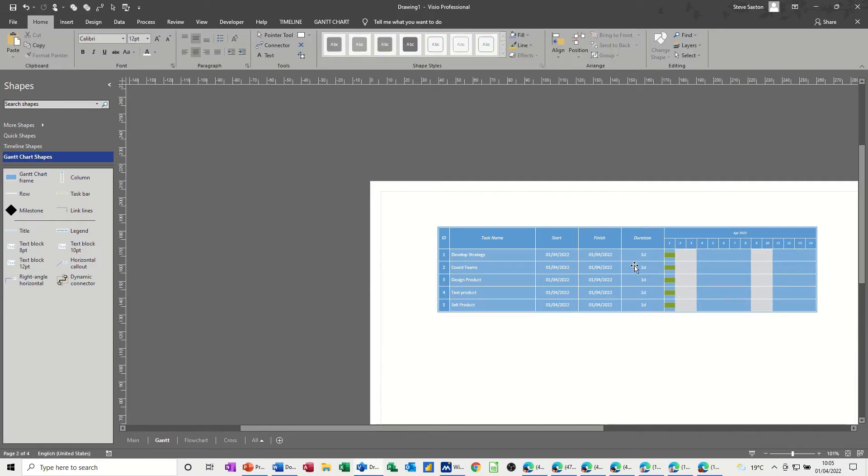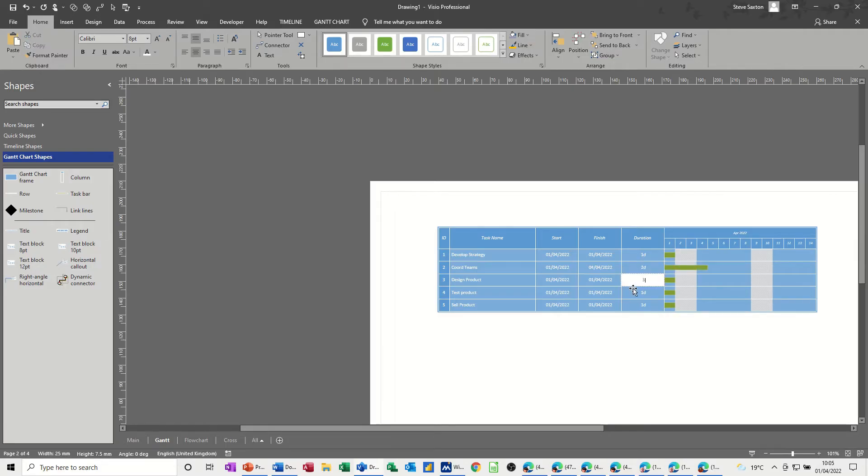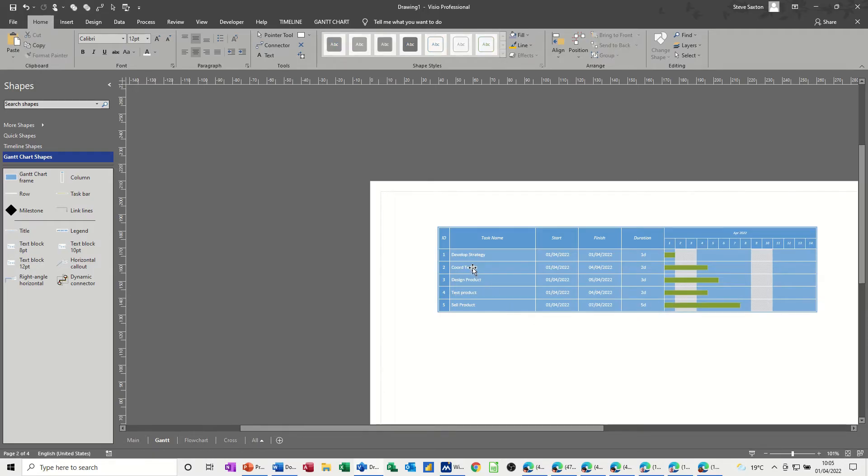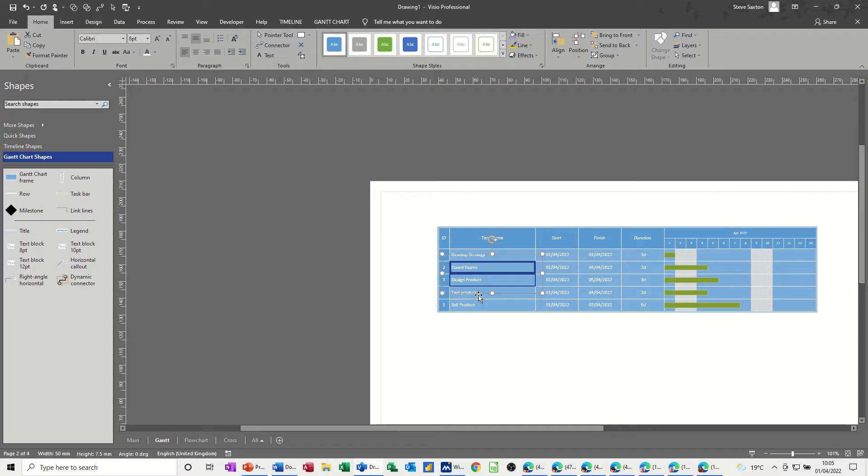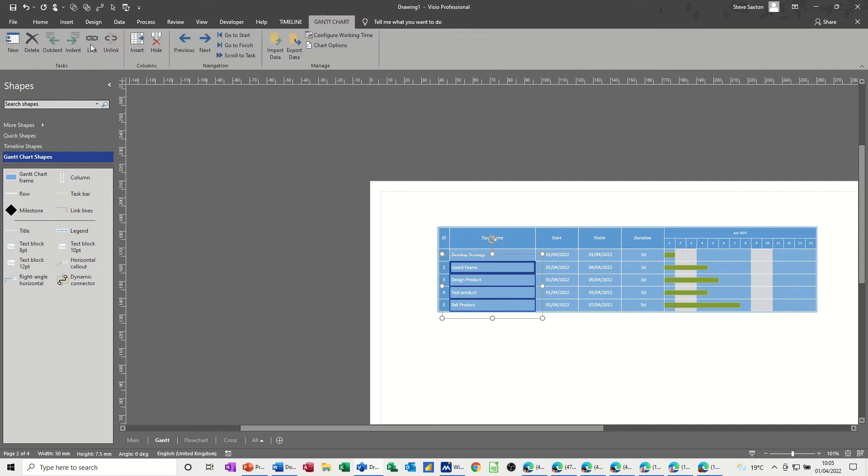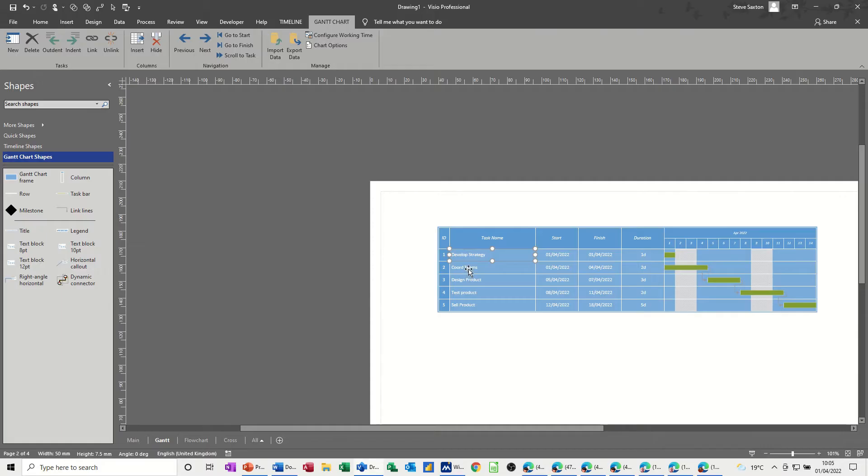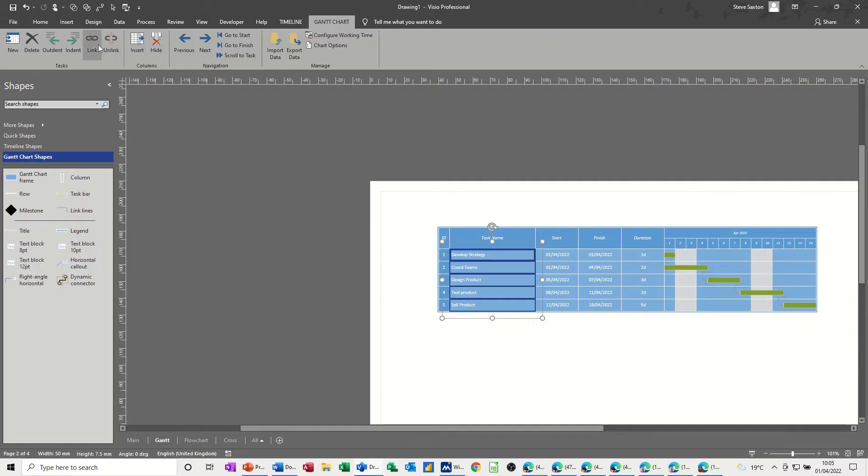Now the durations for these, I'll just leave this as two days, three days, two days, five days. Now I want to link all these together, like so. So just go up to the Gantt chart, and link, and they all need to be linked under that.